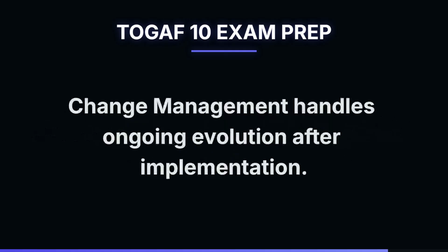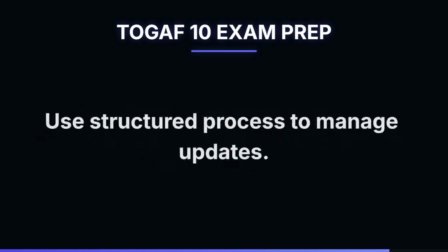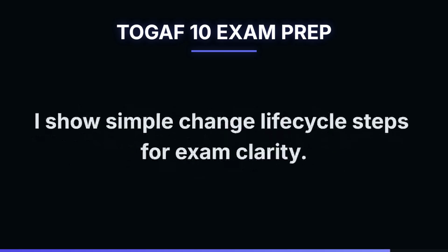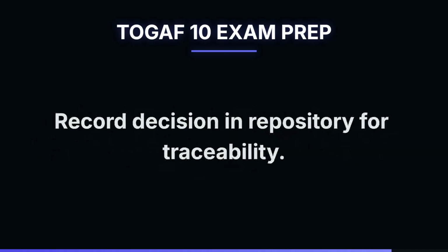Change management handles ongoing evolution after implementation. Business environment changes, and architecture must adapt. Use structured process to manage updates. I show simple change lifecycle steps for exam clarity. Submit request, assess impact, approve change, implement update. Record decision in repository for traceability.